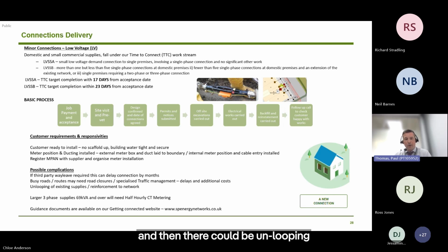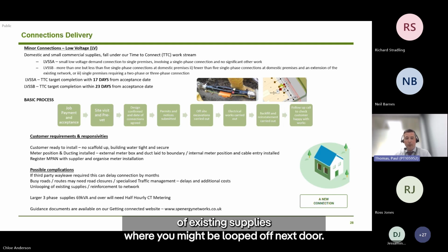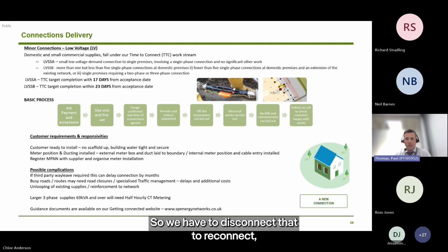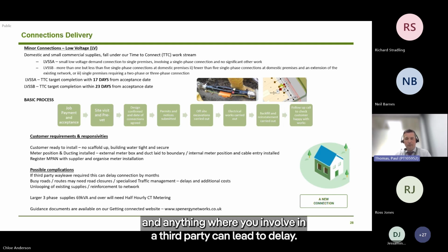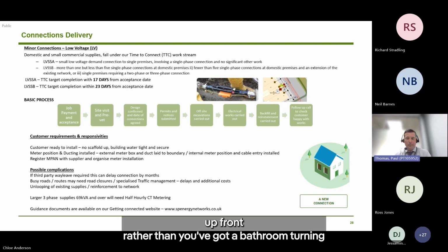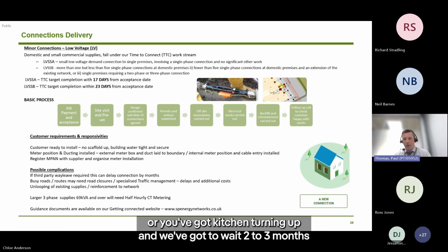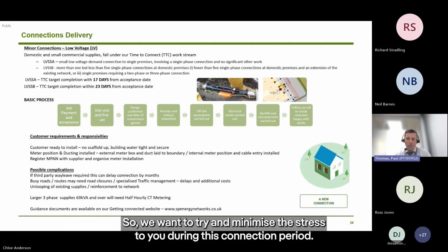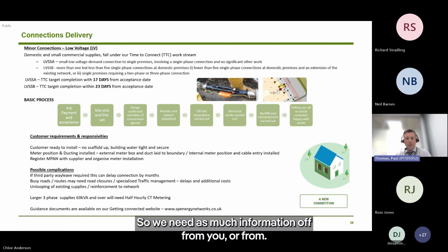And then there could be unlooping of existing supplies where you might be looped off next door, so we'll have to disconnect that to reconnect. Anything where you involve a third party can lead to delays. So it's always worth knowing that up front, rather than having a bathroom turning up and you need it done tomorrow, or a kitchen turning up and we've got to wait 2 to 3 months to get the connection. We want to try and minimise the stress to you during this connection period, so we need as much information from you up front.